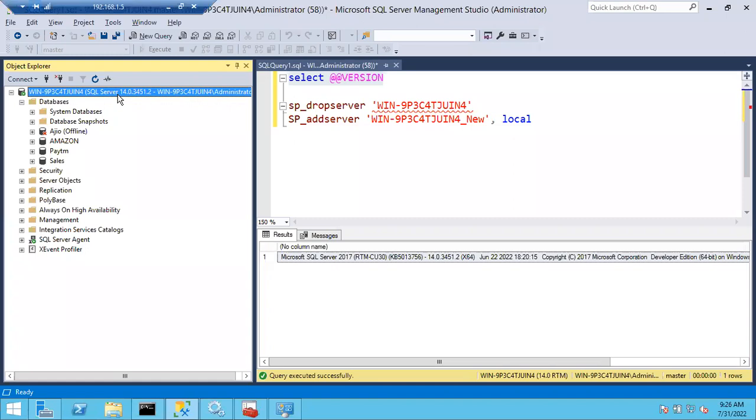Okay, after successful patching also, again you have to send an email to the same team. You have to reply to the customer and the DBA team. Hi, so and so customer, the server is successfully patched with SQL Server 2017 CU30. From the database side, everything is looking good. Please check from the application side if everything is looking good or not. In case of any issues, please get back to us. Like that, we'll send an email to the customer after successful patching.